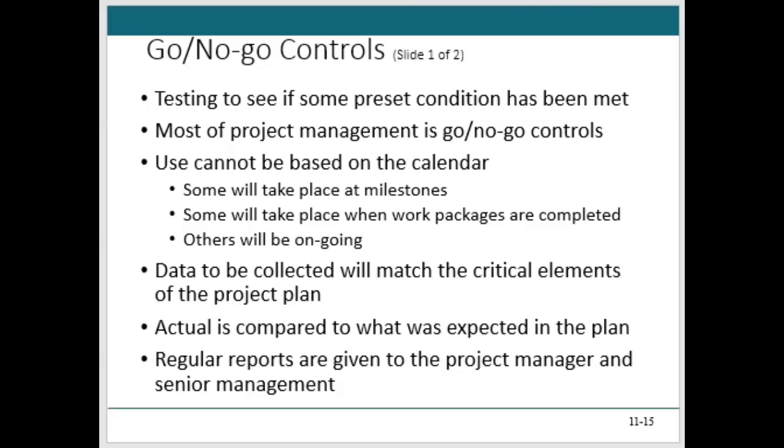So these controls basically should be linked to the actual plans, right? So that's why I tie it to the baselines. That's part of our project plan. These controls should be linked to the actual plan and the occurrence of real events, and those are the milestones. Not simply tied to some calendar, right? To an event, a milestone. And so we want to constantly monitor the baselines, but particularly around the milestones. The project manager must keep abreast of all aspects of the project and follow up. And we want to establish then some sort of early warning system as part of this.